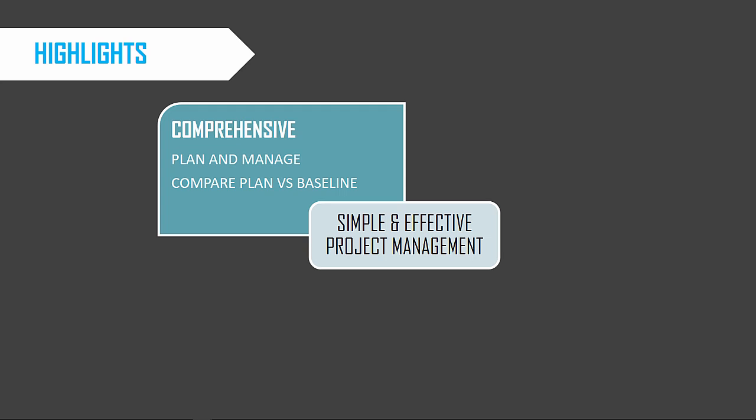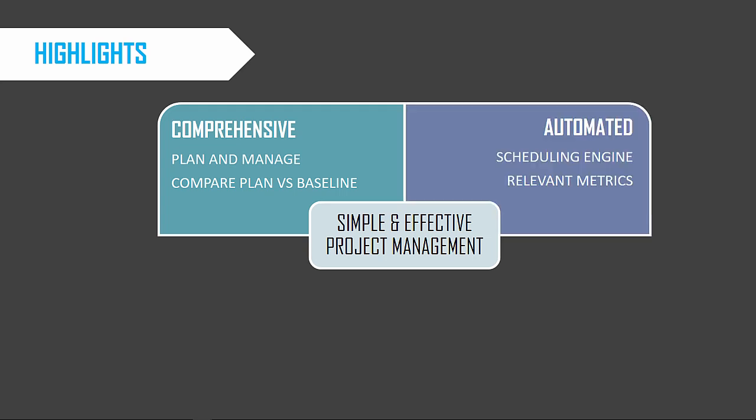We can set a baseline plan and then, as we update the actual work performed, it allows us to compare current plan versus baseline at any time. It includes an automatic scheduling engine. The engine takes as input the list of tasks, work required for each task, assignment of a resource to each task, and the resource availability. Using these inputs, the template calculates which resource works on which task for how many hours on a given day.